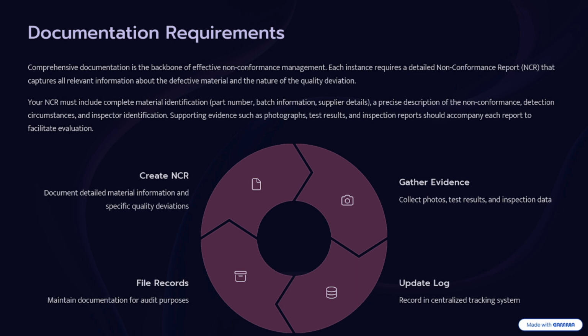In that NCR, you will mention the material names, the specification number, the material submittal approval number, then the delivery note number, because you are taking that from your delivery notes. So you need to ensure that the delivery note for that particular material is correct. Once you mention the delivery note, you will also mention supplier details. Then you will attach the photo.